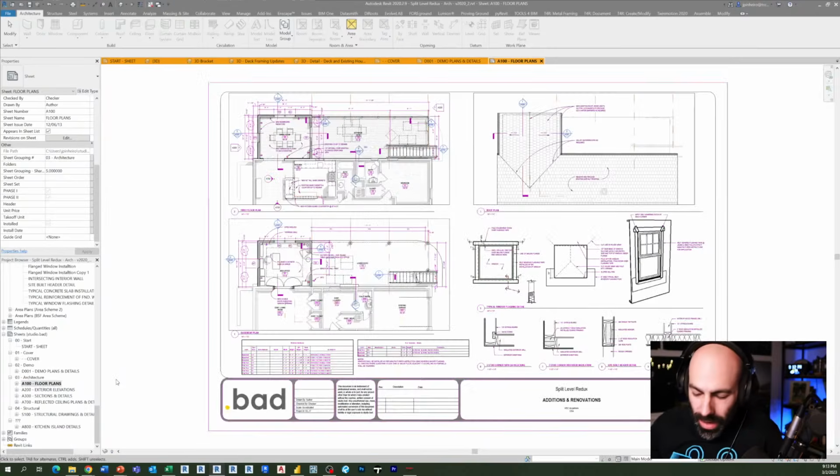The one thing that I did learn is, once you use these drawings to go out to the subcontractor market, framers, concrete, you name it, some of the feedback I got from some of the subcontractors was, why don't you take some of the color and the shadows and the pretty stuff off when you're going to subcontractors? Because when we see that, we think expensive.